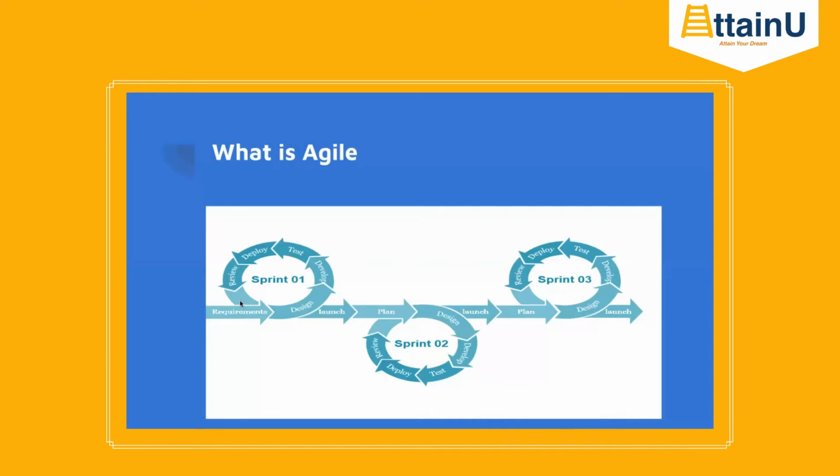Okay. So for most of the companies, your sprint is between 1 to 3 weeks, right? In 70% of the companies, it is 2 weeks. So it is for that specific feature that you are going to do. For the next 2 weeks, you exactly know what you are going to develop, and the testers know what they are going to test. Your managers know what they are expecting from that feature, and things like those. So the whole project is divided into 2 weeks each.